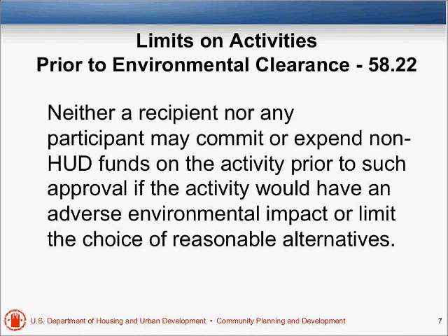What does that mean? Let's say there's a historic building that's on your site, and you're saying, gee, can we knock it down before we get the HUD funds, and just a private person will do it? And the obvious answer is no, you can't. If you do that, you may pretty much knock out any chance of federal funding for that project.